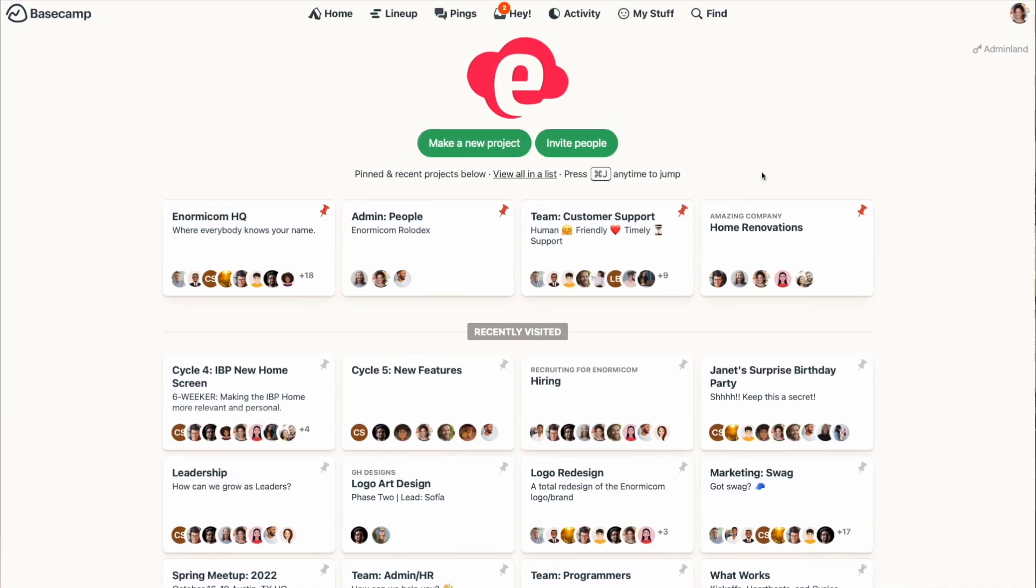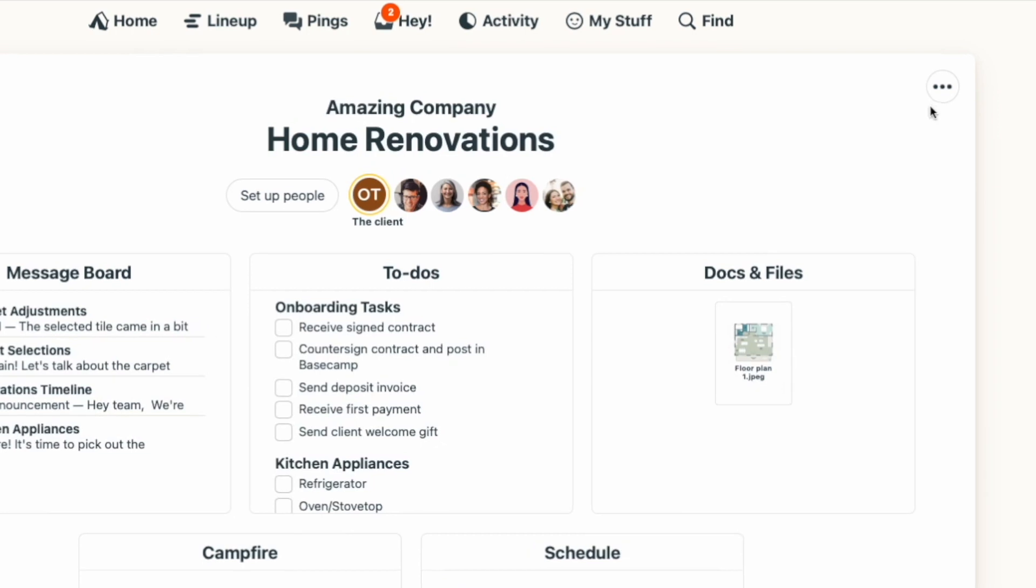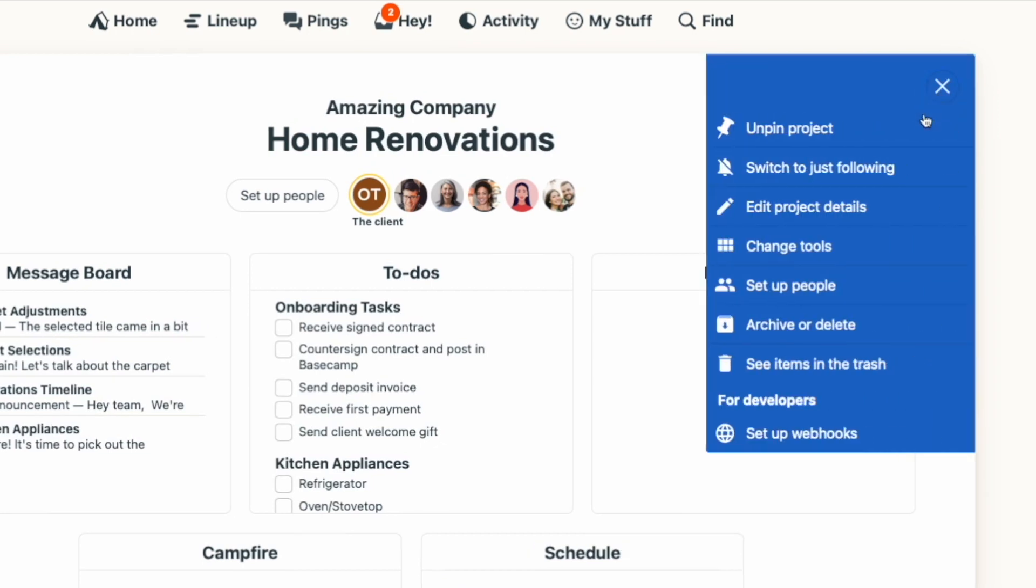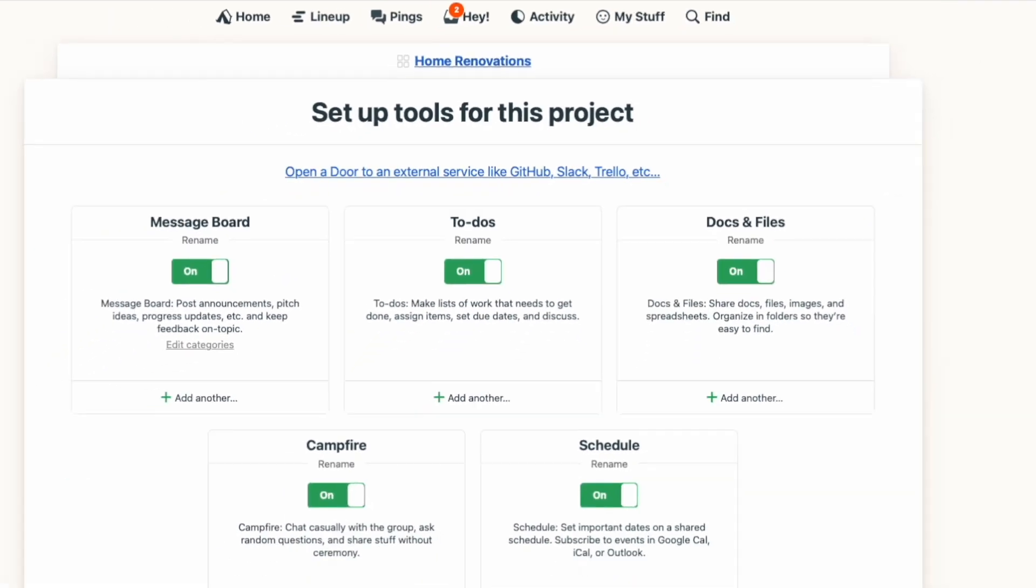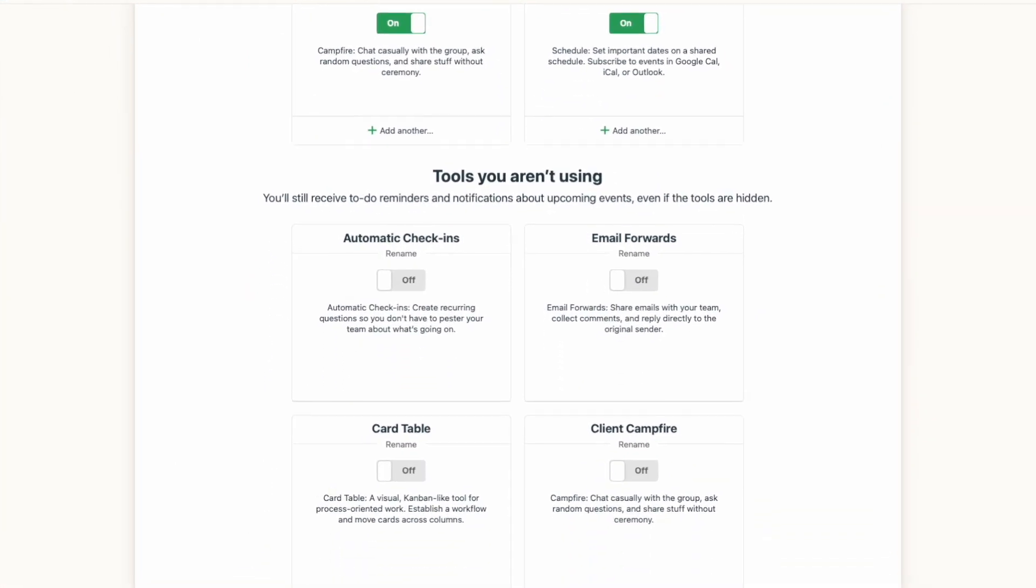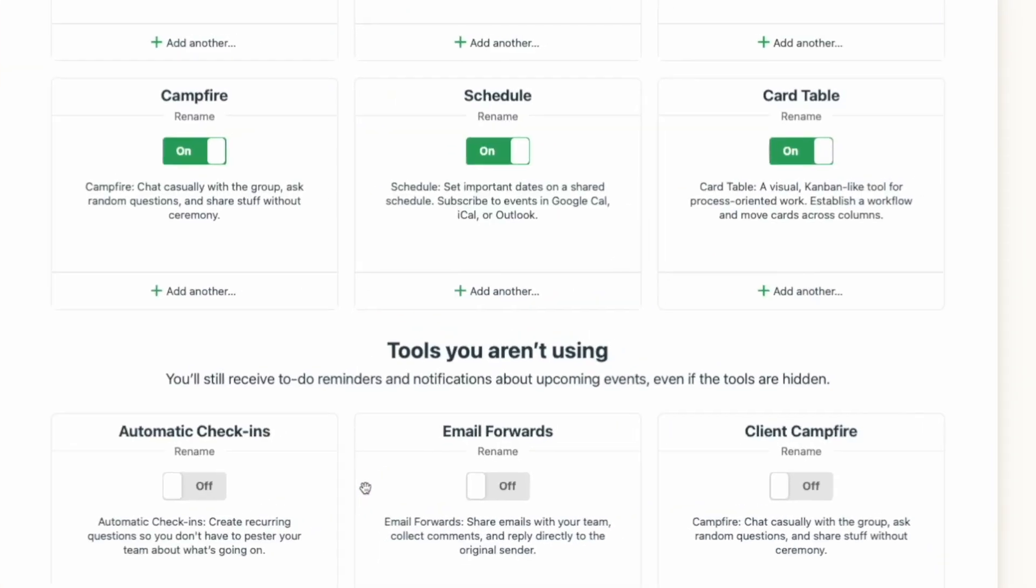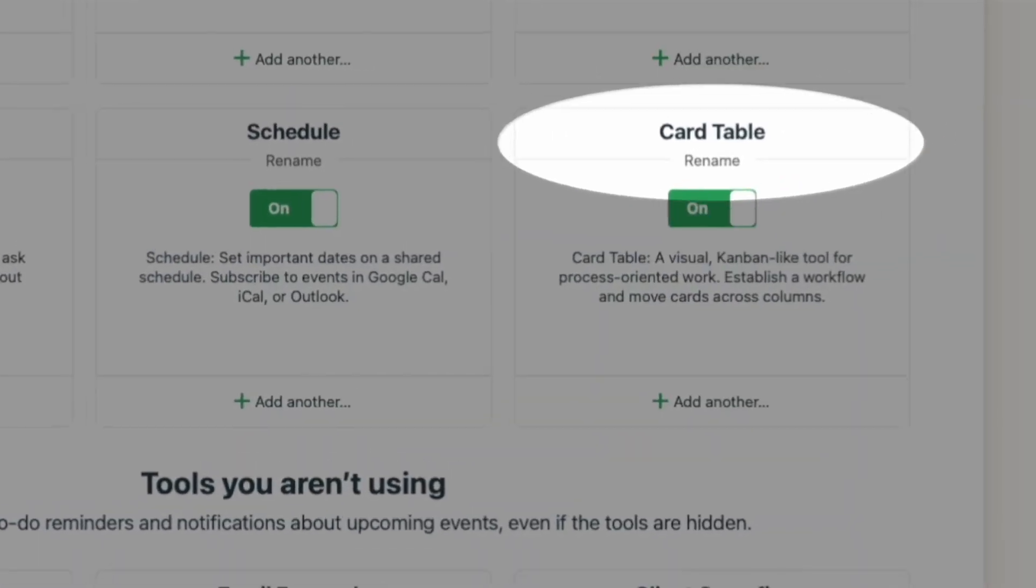Now first, to add the card table tool, you'll use the three dot menu at the top right of your project page and select change tools. You'll toggle the card table tool on, and in this section you can also rename it if you want to.